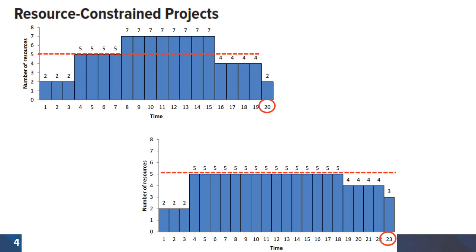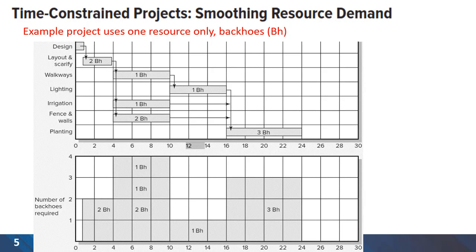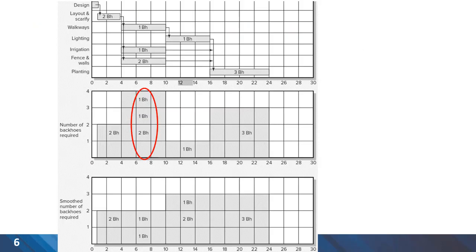We will be looking at different examples. Here is an example for a landscaping project. As you can see, there is only one resource required for the project, which is a backhoe. There are different activities shown on the Gantt chart with arrows demonstrating relationships between the project's activities. We have an increased demand for backhoe between periods 4 to 10, where 4 machines are required in that period of time. We can see this in the middle graph.